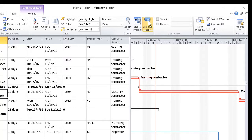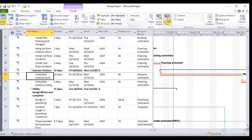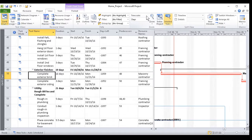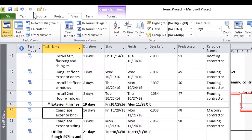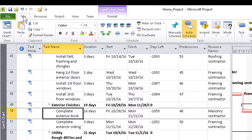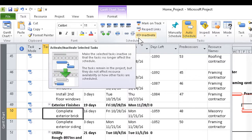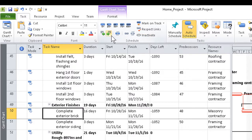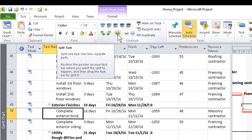Next, go to the Task tab and within it the Schedule group. The button for the Split Task feature looks rather like a broken candy bar in its wrapper.